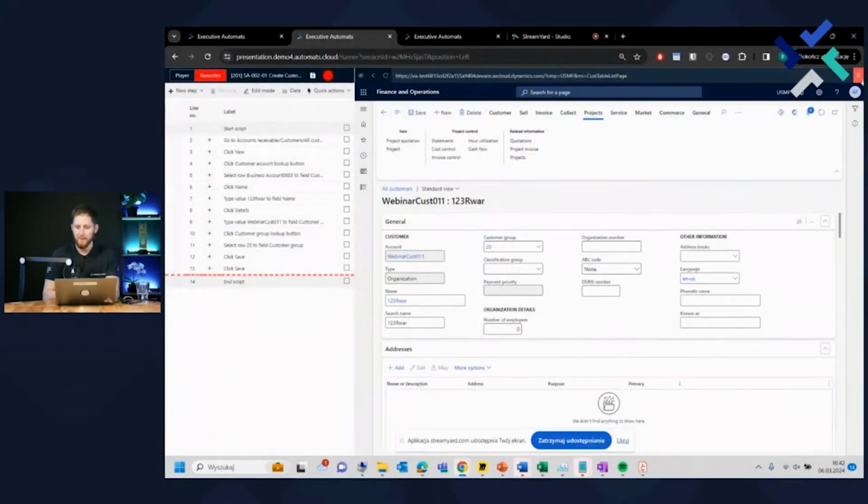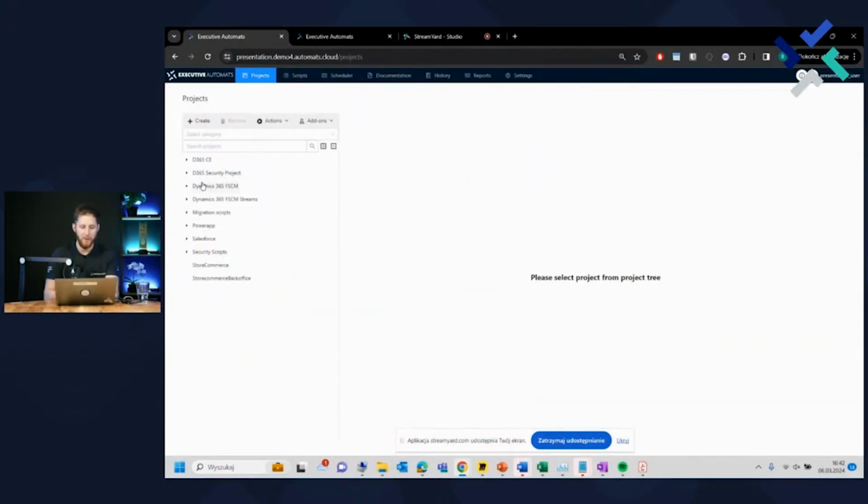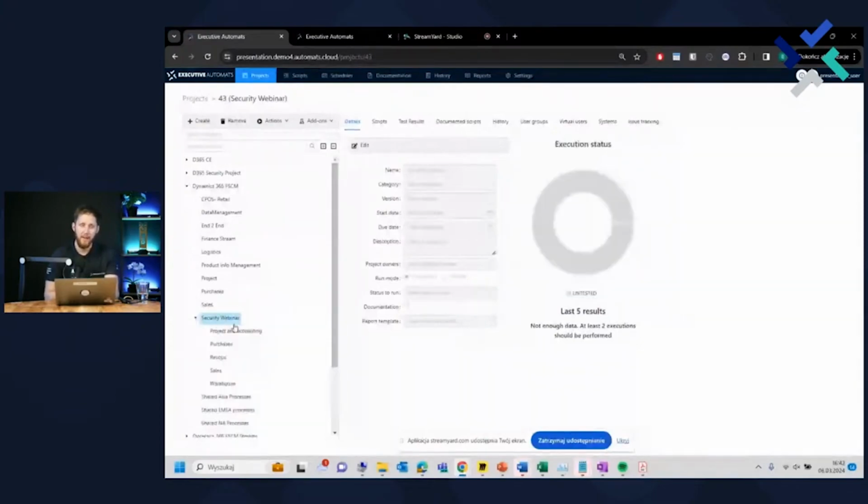So close. Typically, the projects are about creating the roles for people who have 5-10 processes. So recording will take you an hour, maybe 1.5, then conversion, and within 3 hours, you are happy with a new role created. So this can be very slick.